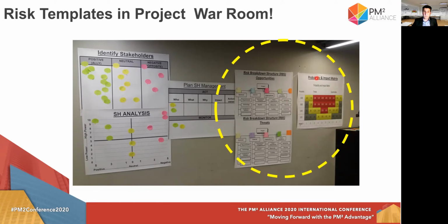The size, especially of the RBS, is influenced by the stakeholder attitude towards risk. If someone is risk averse, this stakeholder probably needs a lot of information, so the RBS will become wider. And if someone is a risk seeker, the risk breakdown structure will probably become smaller.